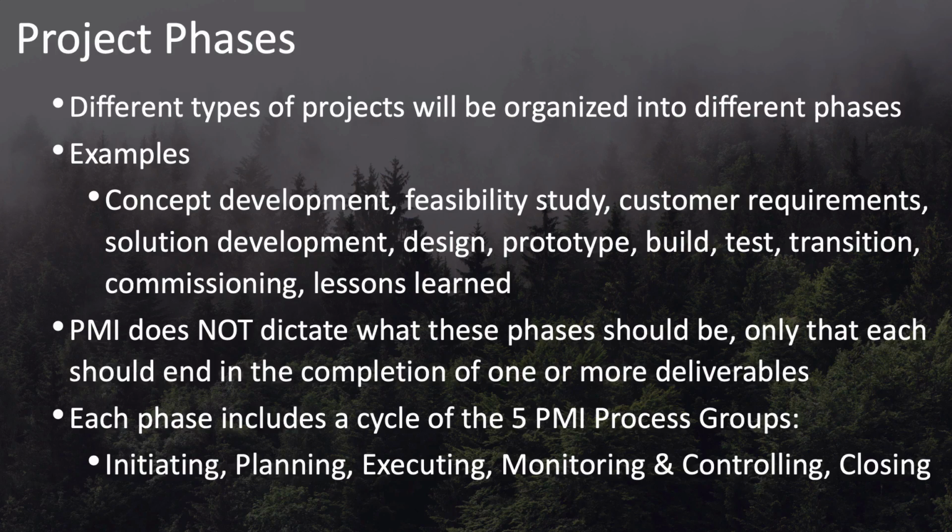Because different projects can be so different and have such unique needs, PMI does not, of course, and cannot dictate what the different phases should be for your project. But they do specify one thing, and that is that each phase should end in the completion of one or more deliverables. So at the end of your concept development, you should have a deliverable that expresses the concept and the decisions that have been made about that concept. A feasibility study phase should result in a feasibility study. Customer requirements should end in a requirements document. A build phase should end in some deliverables that can be tested and transitioned over, and so on.